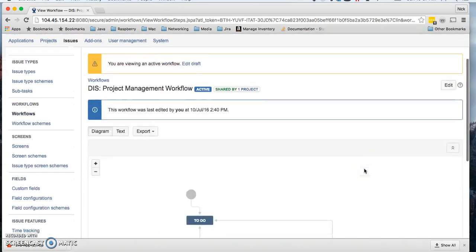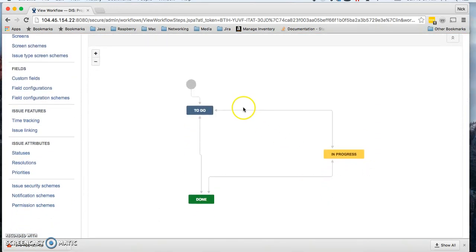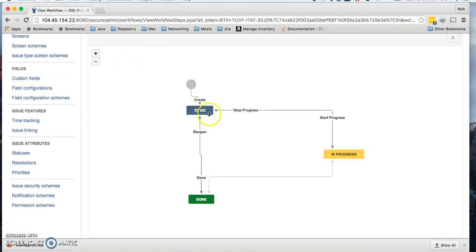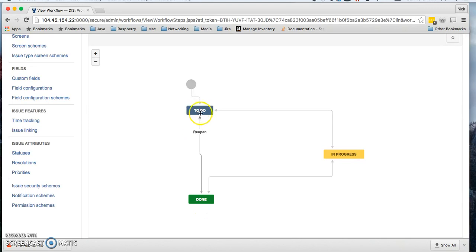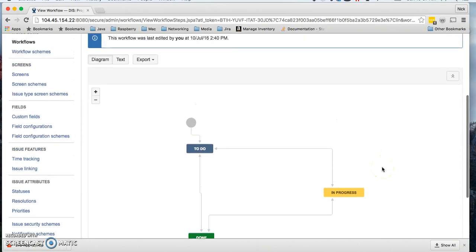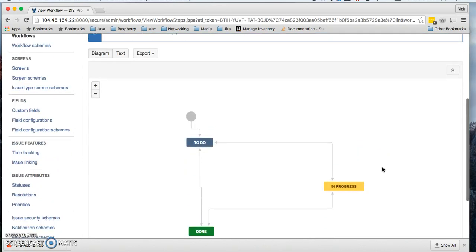It moves over into in progress. From in progress, it can either be failed and go back to to-do, or it can move forward again into done. Once it hits done, it's completed, but maybe something went wrong with it and you want to reopen that issue or revisit it. You can always reopen it, goes back into to-do, and then you can walk it back through the workflow.